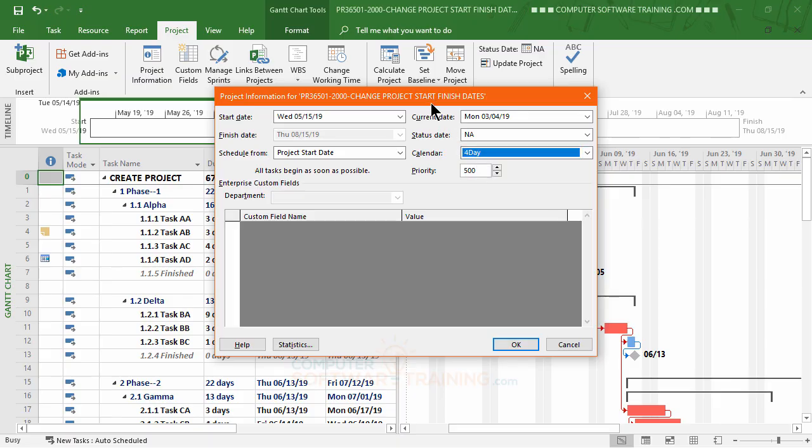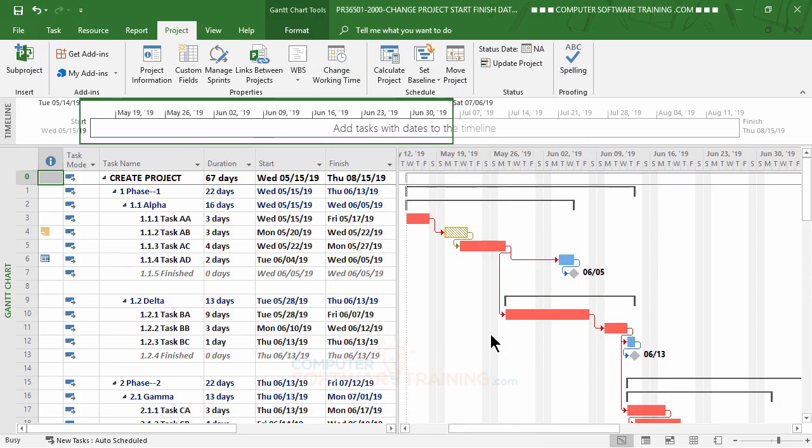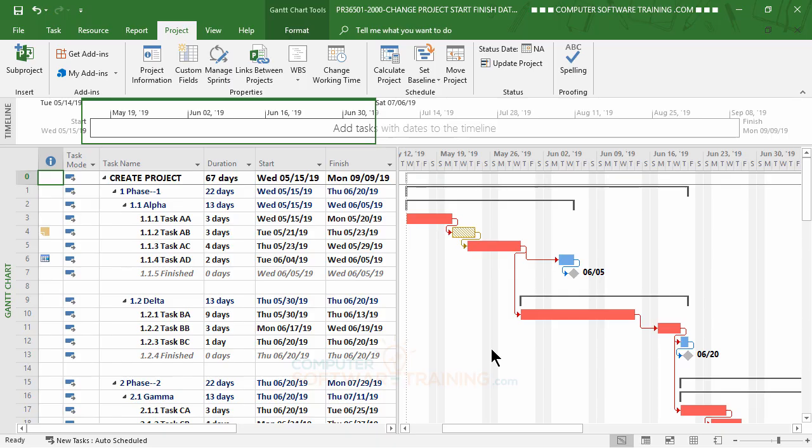Now look at this. We're ending what on 8:15, right? Hit OK. Look at that. Because we're not working Fridays, we almost add almost a month to everything. Now, a little funny thing here though. When you look at the scale here out here in the Gantt area, it doesn't show Friday with a gray bar, even though Fridays are affected. In other words, it's going right over. Friday is not a work day.